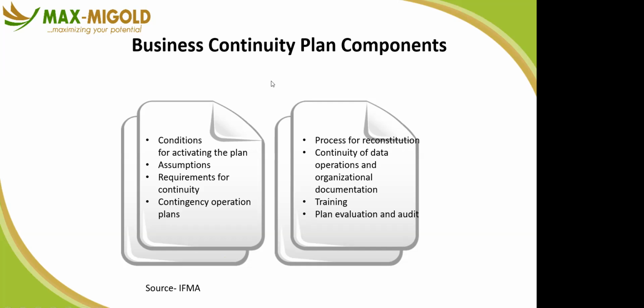Definitely, sir. So when ... for their health and safety policy, ask for their environmental policy, ask for their emergency response plan. Number 3, ask for their general risk assessments for that job, where they will speak to the activities, what can go wrong, how likely, how severe, and what they plan to do to mitigate this.